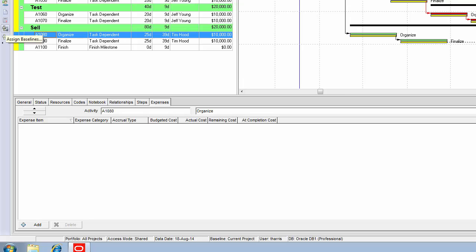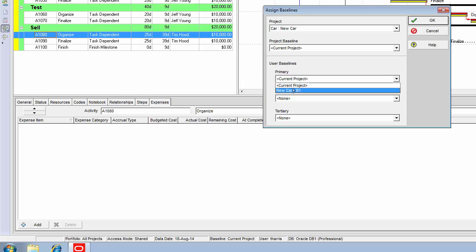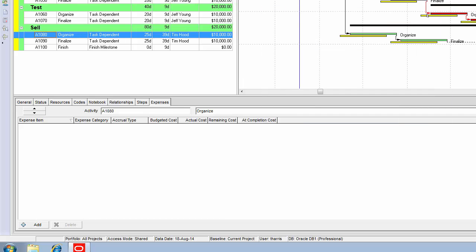Whenever you are using baselines, you must make sure you do those three things. Create it, assign it, and make it visible in the Gantt chart. And then, we're seeing the correct picture now. That's it. That's an update, a first update for our car project.